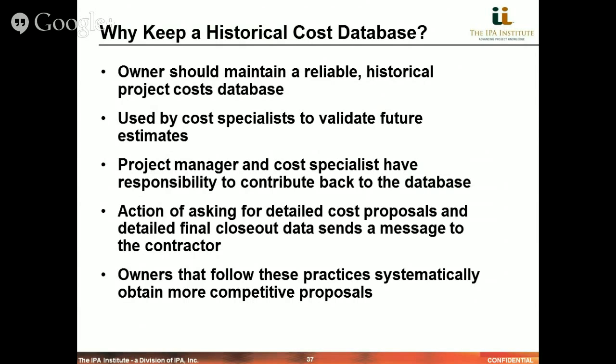And one of the keys of this process of a good project control system is that the project manager and cost specialists with each team take on the responsibility to contribute back to the database. That means closing out the project, completing all of the cost reports, getting all the detailed information, and compiling it into the right format that it can be incorporated into the project's documentation and data system.